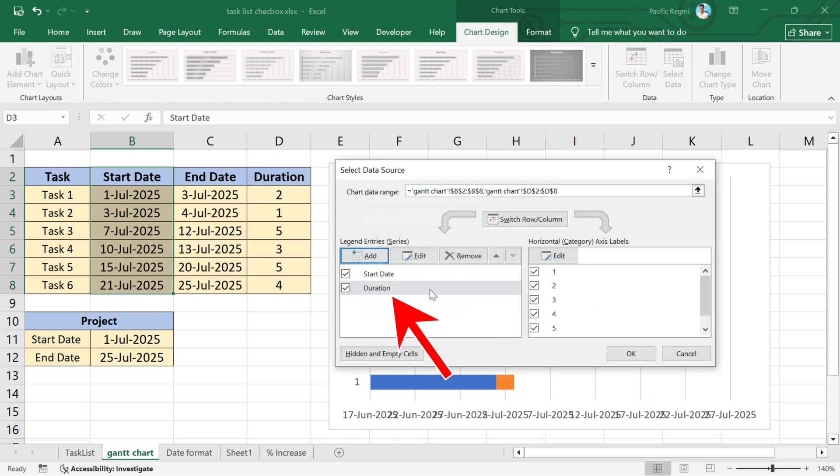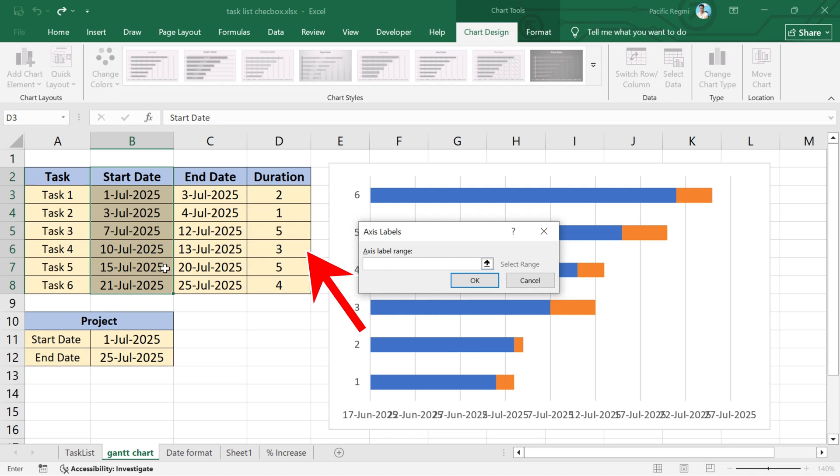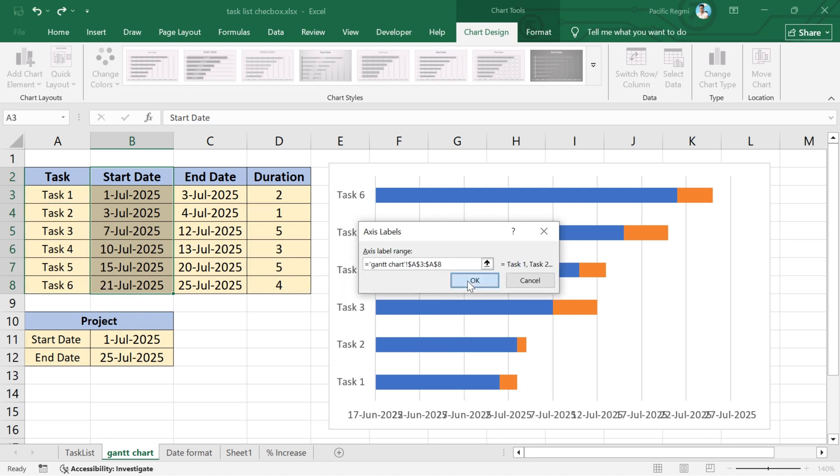Now, select duration, and then under horizontal axis labels, click on edit. Under the label range, select all task labels from the table. Once selected, click OK.